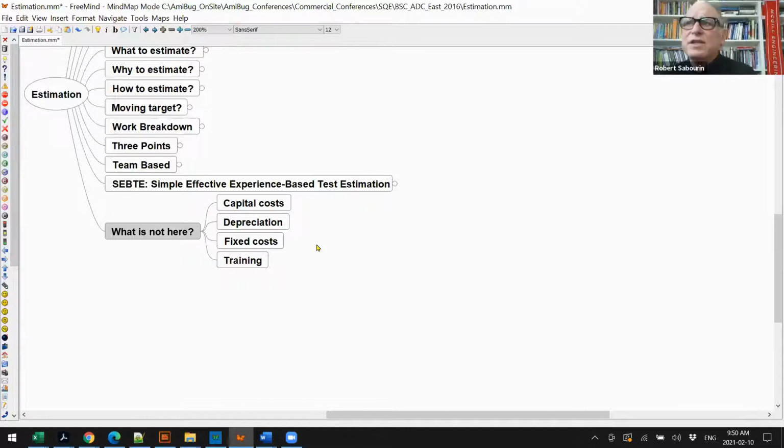But the method is basically a work breakdown, that's all. So it's the way you give the work to someone who's a tester in your team. So you break it down into objectives, charters, and chunks of work, and you give a chunk of work to someone, and then every session, they pause. They do the work up to the session. They're not trying to squeeze it into one session. Instead, every session, they stop, they review what they did, they accrue value in your project, they share what they learned, you take action on it, and you decide, is it worth continuing to do another session on this charter, or should we move on to something else?